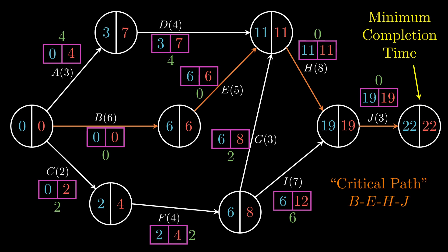In interpreting this and answering more complicated questions surrounding this, the main thing to keep in mind is that if you need to make any improvements to the whole project's completion time, you need to make those improvements on the critical path. So speeding up activity A or activity D doesn't make a difference, because the urgent chain of activities, the one that's going to be holding you back, is this critical path. So that's the place. Those are the activities to make those improvements.